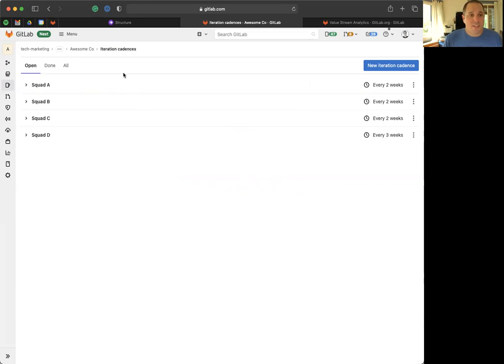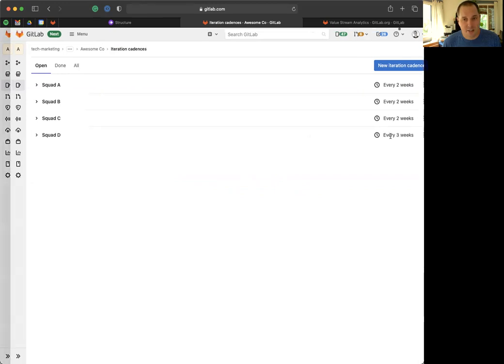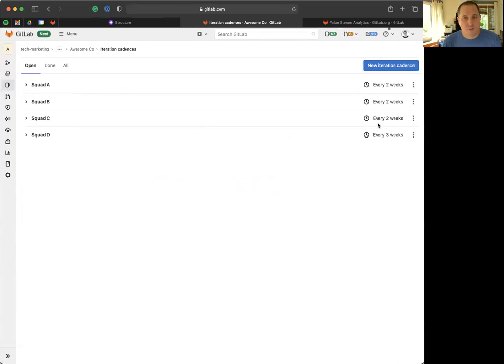The other nice thing about this is if you have lots of teams that are sharing one group, you can have multiple different cadences that all run on their own schedules. So here we can see these 3 squads run every 2 weeks, but Squad D, they want to have 3-week iterations, which is fine. And they're able to do that now.